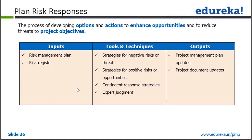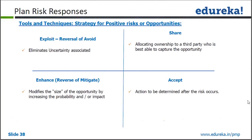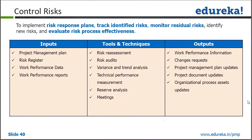To control risk: conduct risk assessments at regular intervals, perform variance and trend analysis, and do reserve analysis to see how much reserve has been consumed versus how much work has been completed. Risk monitoring tools include risk audits, technical performance measurement, and status meetings. Control risk outputs include work performance information, change requests, project management plan updates, document updates, and OPA updates. Risk audit scenarios: at every milestone you reassess the risk register — this is reassessment. Finding a missing planned feature at a feature-complete milestone is technical performance measurement. Identifying higher-than-normal defect rates by comparing across projects is trend analysis. A risk expert reviewing response strategies and identifying missing secondary risks is a risk audit. Checking reserve sufficiency after implementing a $4,000 risk response is reserve analysis.